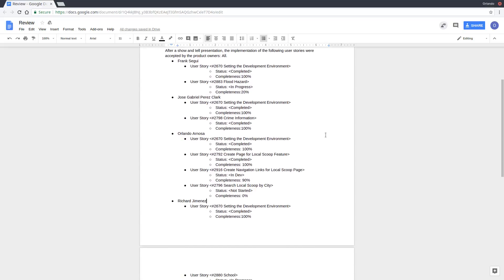Myself, besides the development environment, I did UserStory 2792, Create Page for Local Scoop feature. That was completed. And UserStory 2916, which is Create Navigation Links for the page, is still in development but it's about to be complete with about 90% of it done.